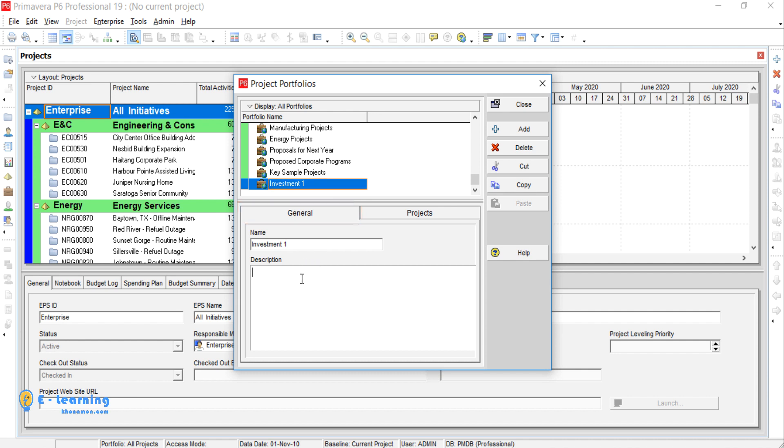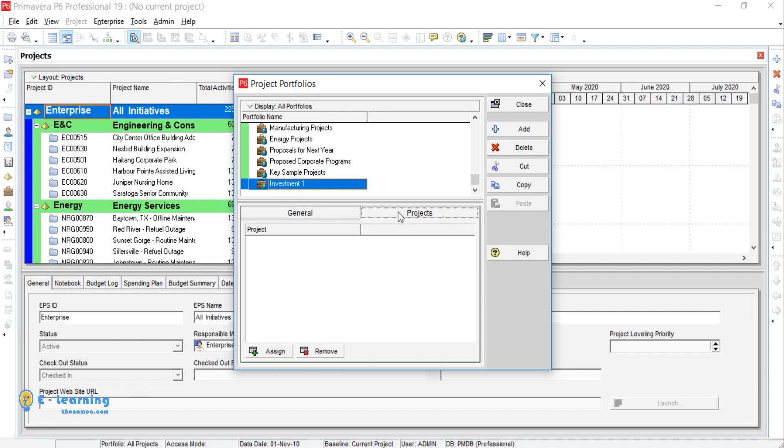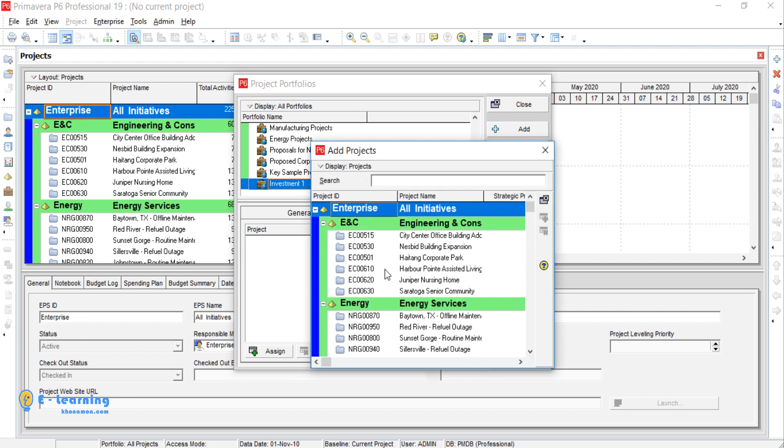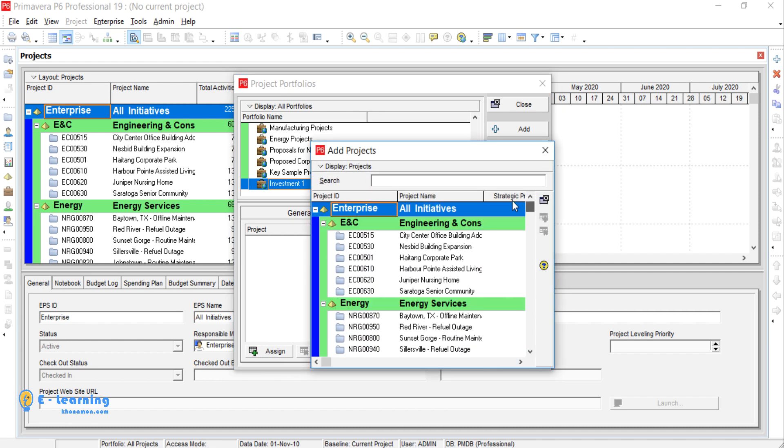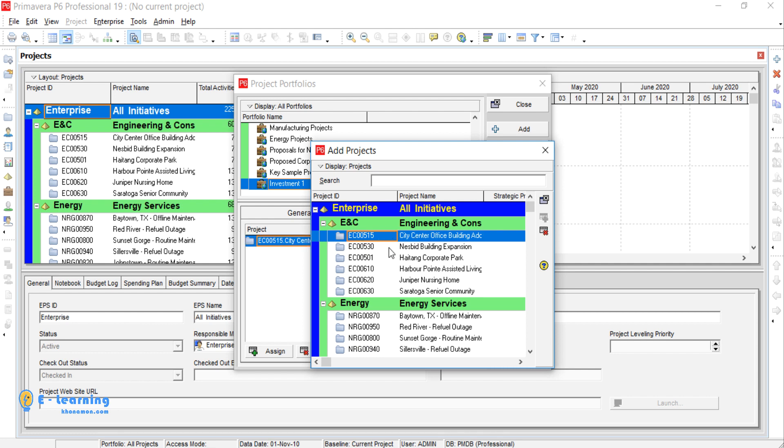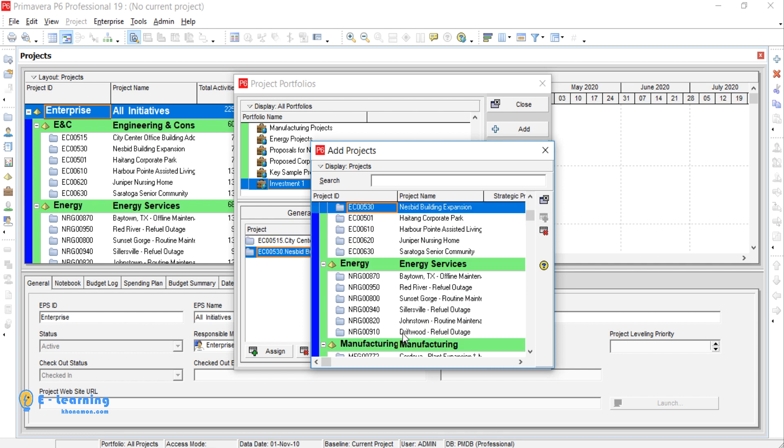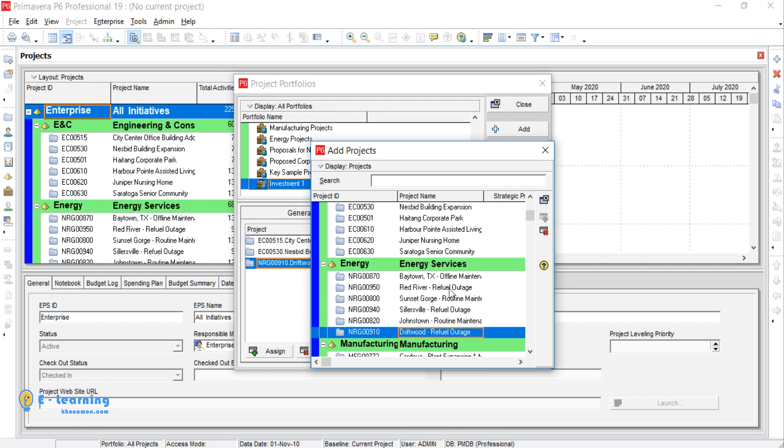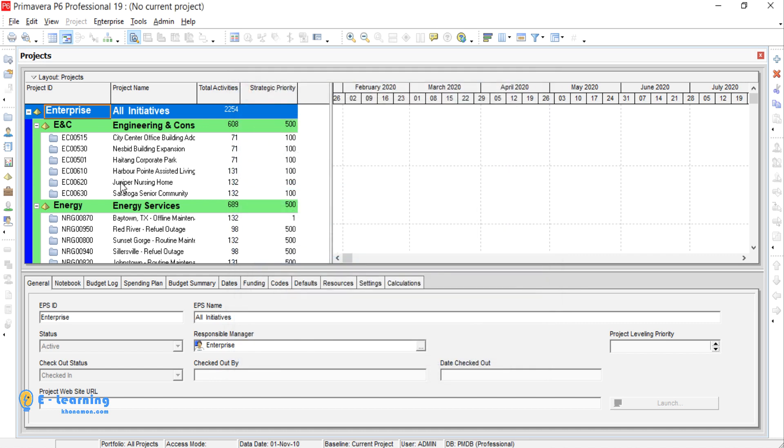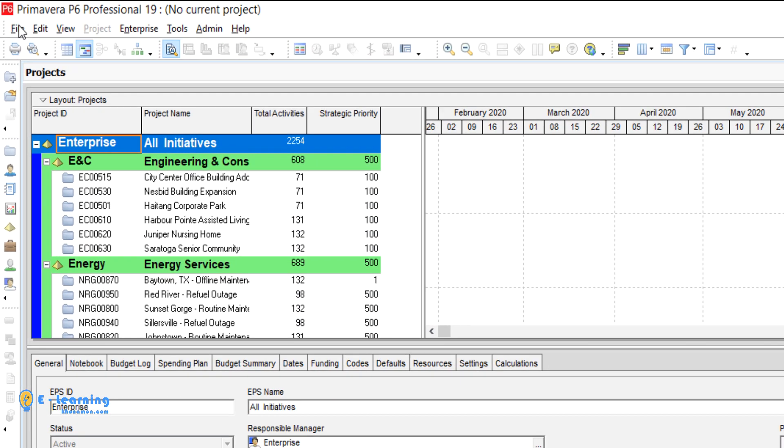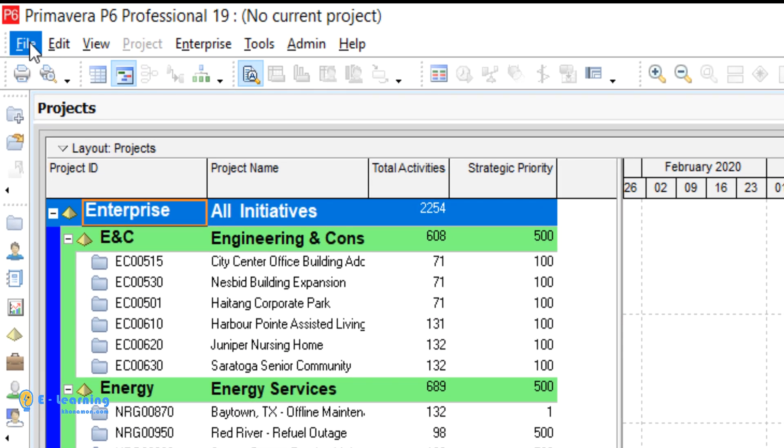On the Projects tab, by clicking on Assign, the projects are shown to you. Any project you want to be in Investment One, you can double-click, and then Finish.